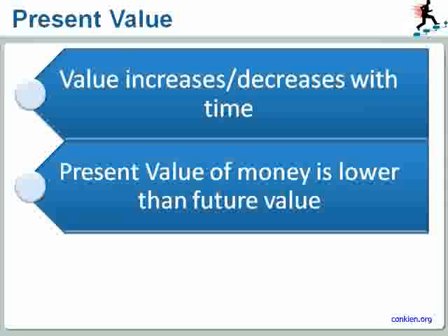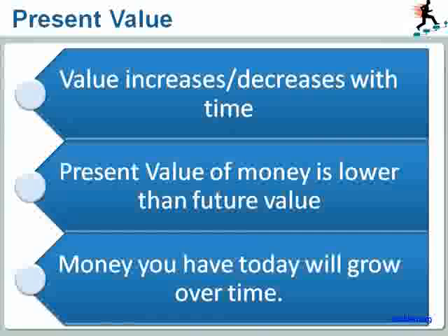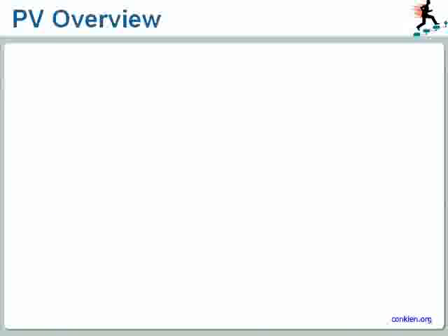So if my plan is to give you these $10,000 in 3 years, and you come to me and say, can I please have this money right now? I'm going to say, sure you can, but not the whole $10,000. I will calculate the present value, which by the way is $9,151, and if you put that into a bank account at 3%, then in 3 years you will have the $10,000. And that's the idea behind present value.